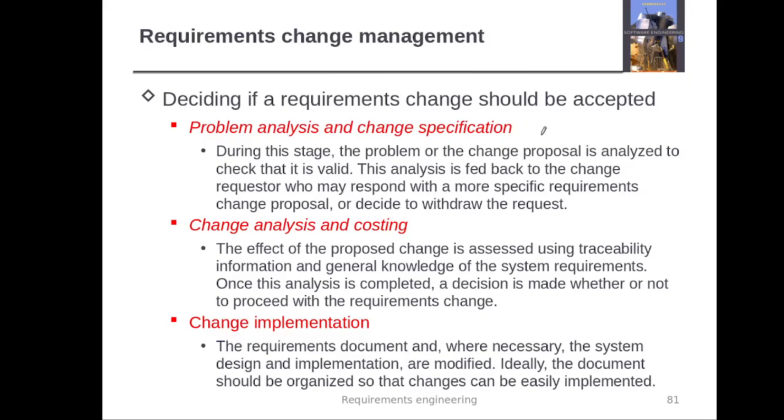You will analyze the problem, that this is the problem, whether the change is really required for this or not. After that you go for change analysis and costing. You try to understand that if this change is done, what are the linked requirements which will be affected, and they will also need to be changed, and what will be the cost of this particular change. Then there will be change implementation.